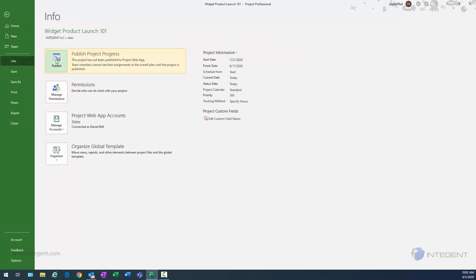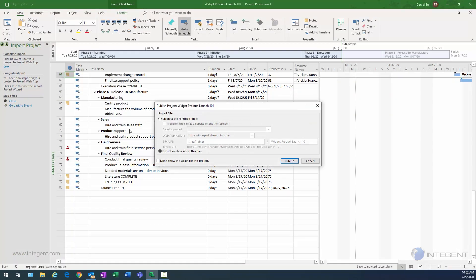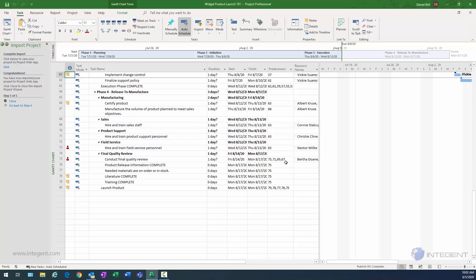I'll go to info and then we'll click the publish button. And this will go ahead and take care of the entire project plan. And it'll also give me an opportunity to create a project site if I wanted to at this time. I'm not going to, but I am going to click publish. And then now you can see in the bottom right, instead of just the save percentage complete, we can see the publish percent complete here taking place. Meaning now this project is going to be published out to the project online cloud.